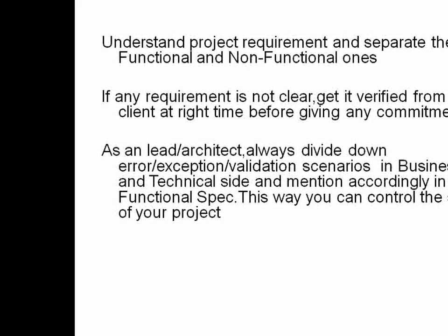Always understand the project requirements and try to divide the requirements into functional, semi-functional and non-functional. See, there are always three types of requirements: functional, non-functional or technical, and semi-functional or semi-technical. So try to classify the requirements and then visualize each classification at a time. See, if I have 100 requirements, it's difficult to visualize all the 100 at a time. But if I divide them into functional category, non-functional category, it's easy to rule. It's easy to understand the requirements.